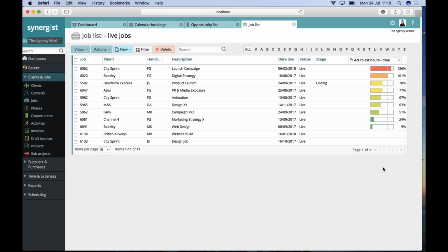It may be due to things like, if we have used that 50% of the budget but we're not 50% of the way through the work, you can identify reasons why. It could be due to human error. It could be that the client has moved the goalposts. It could be that a different resource has recorded the time. A number of different reasons that it could be. But hopefully this should give you that visibility to potentially do something about it if it is, say, the client moving the goalposts. Okay.